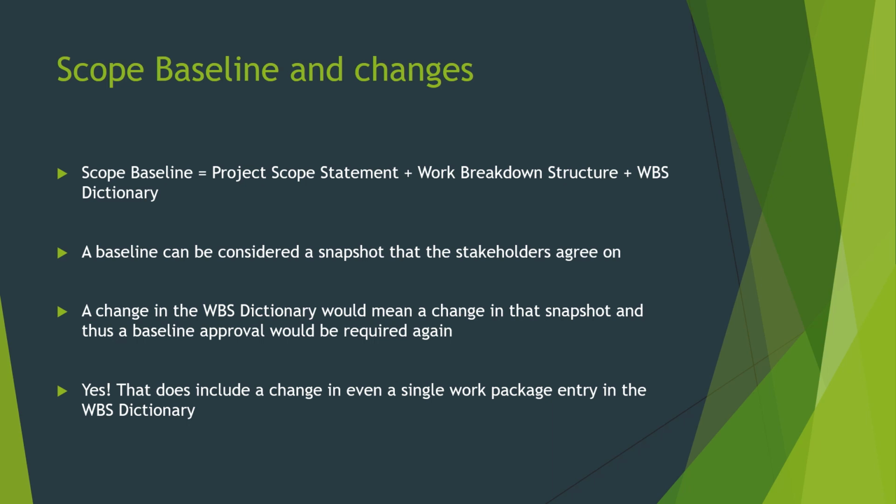So as simple as that. Even a single entry in your WBS dictionary, even a single entry of your work package, if you are making a change, that calls for a change and that calls for a re-baseline of your scope baseline.